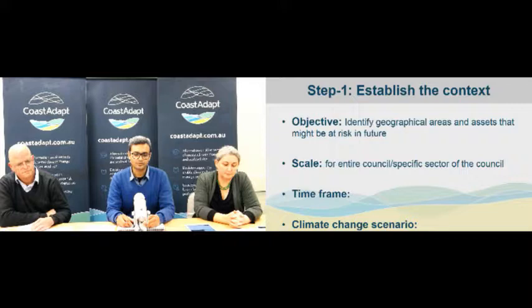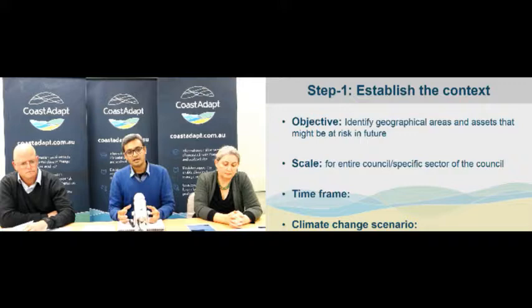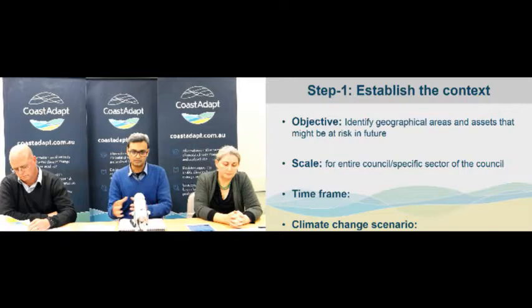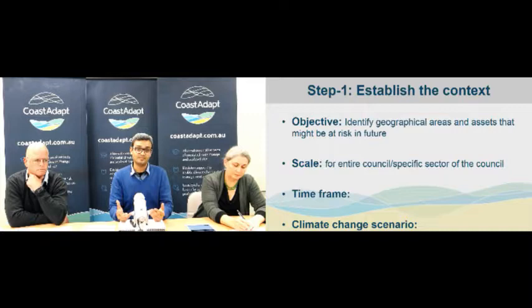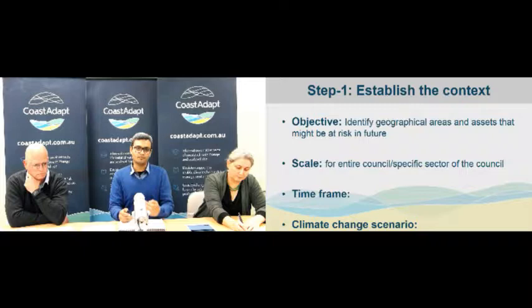So while doing step one, it's all about framing it. It's identifying the objective, identifying your scale. Do you want to do it for your whole council or part of your council, for your whole business or part of your business? You need to decide what sort of time frame you want to investigate in future. And you also need to decide what climate change scenario you want to investigate in future. And the selection of time frame and climate change scenarios can often be interrelated.